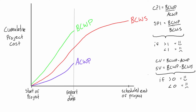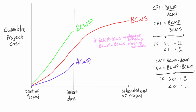To quickly figure out if we're ahead of or behind schedule just by looking at the graph, we use the SPI ratio. If BCWP is greater than BCWS at the reporting date, that's a bigger number divided by a smaller number, giving us a value greater than one — meaning we are ahead of schedule. If BCWP is less than BCWS, then BCWS is the larger number, giving a fraction less than one, which indicates we are behind schedule.